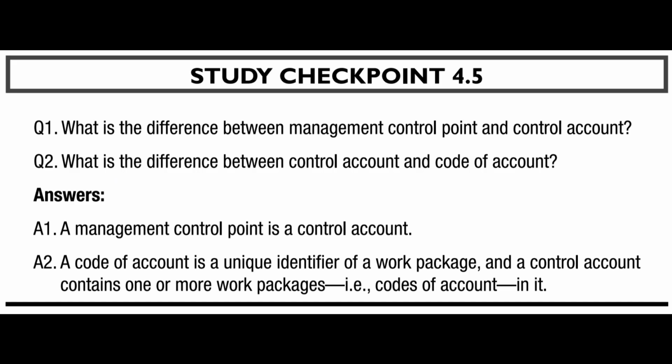Study checkpoint 4.5. Q1. What is the difference between management control point and control account? Q2. What is the difference between control account and code of account? Answers. A1. A management control point is a control account. A2. A code of account is a unique identifier of a work package, and a control account contains one or more work packages, i.e., codes of account, in it.